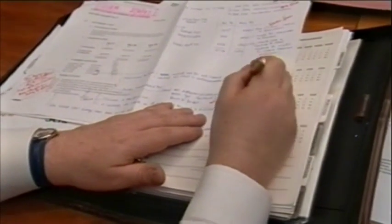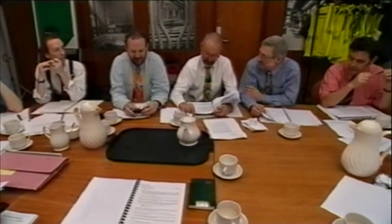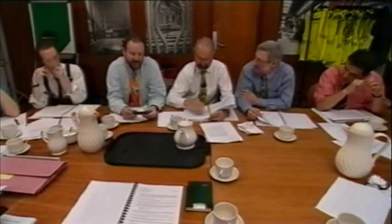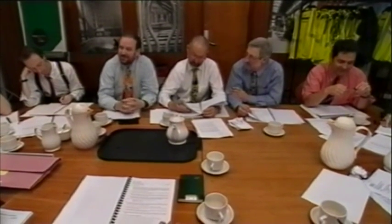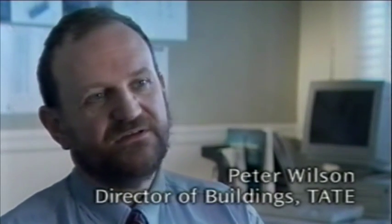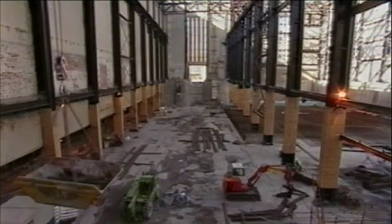They've got nothing to go with. Right. If they could talk to a lawyer, they could talk to us. Well, there is no claim. They just know what the job's cost them. I mean, they have actually exercised their right to come and talk to the client, I think I reported last time. And our view was that they hadn't got a hope in hell of substantiating their claim on the performance. And their approach to us has been, well, this job cost us a lot of money and we're entitled to a profit, aren't we, because we did this work for you. So let's throw away the agreement we made, take the amount of money it cost us, add a profit to it, and you pay us that, please.